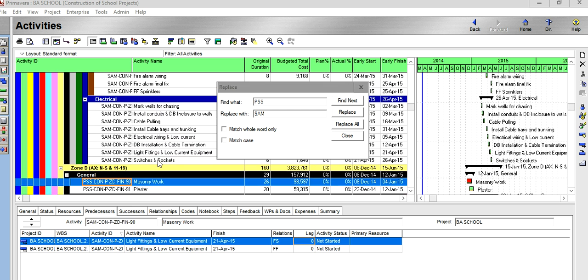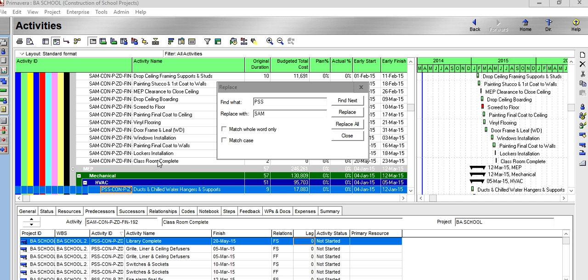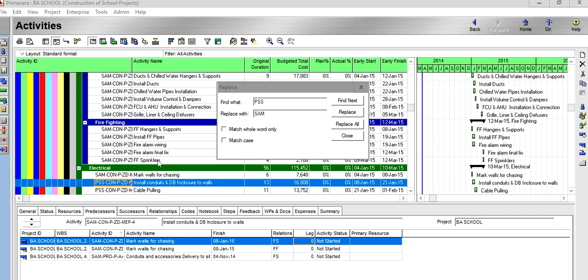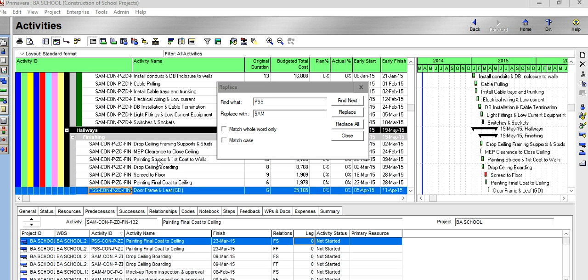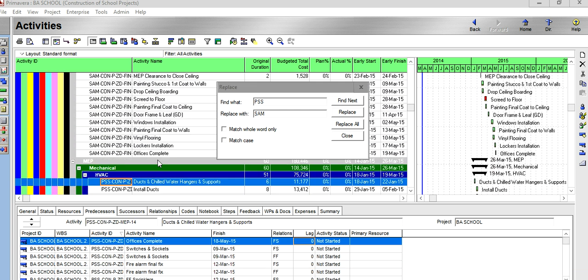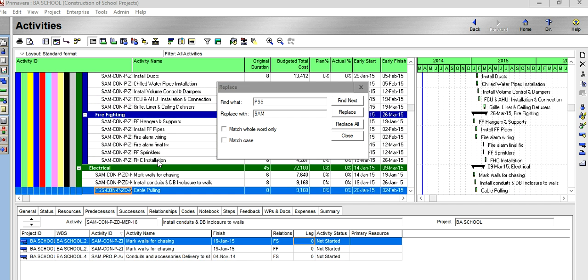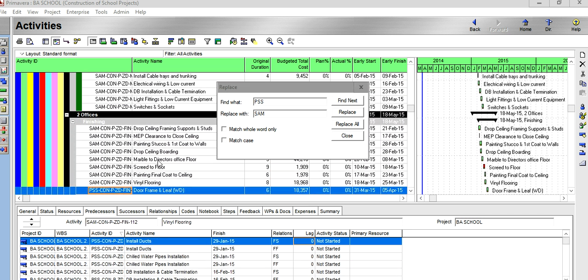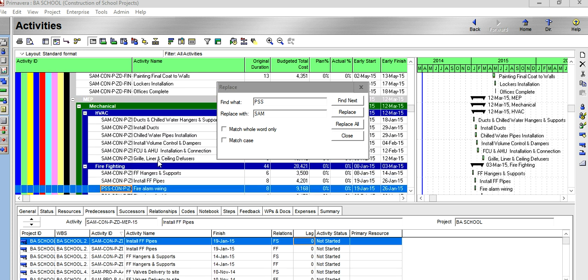The job of the engineer is not only implementation, but they also have to check the baseline if it is applicable. Any variances shall be raised to the planner and discussed and sorted out. So we have to make sure, without affecting the completion of its activity, that we foresee the risk of its activity.